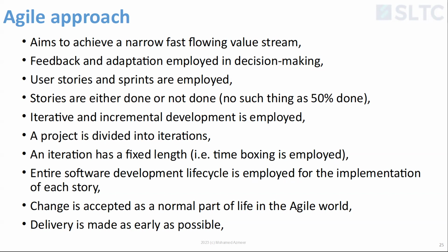And then it's also a very iterative and incremental process. The whole project is divided into iterations, and each iteration, generally in Sri Lanka, is about 2 weeks, right? It's called time boxing. So we use about 2 weeks of iteration, or a sprint is 2 weeks. So we work for 2 weeks, nobody is disturbing you. After 2 weeks, you come and demonstrate what you have done, and then you go to the next level, right? Next 2 weeks. So all the changes and updates that you receive for the first 2 weeks of work can be taken to the next 2 weeks of work.